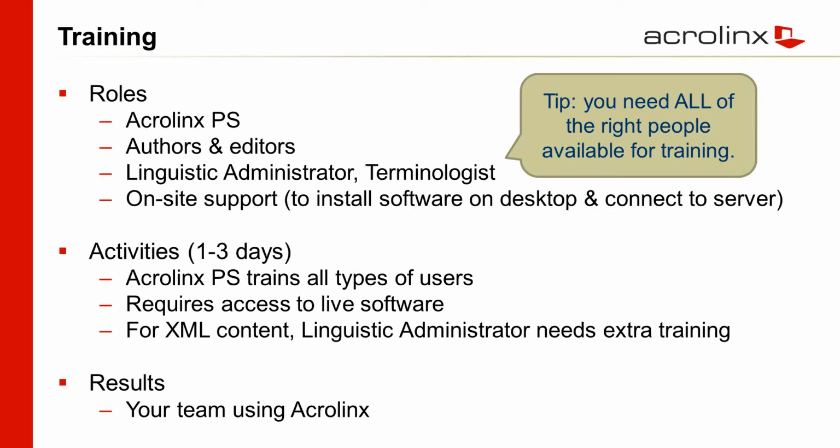Training can take between 1 and 3 days. Our team comes in and trains all the various user types. It does require access to live software, which means it has to be installed both on the server and on the user's desktop. And if it happens to be XML content, the linguistic administrator will need some additional training beyond what's talked about here. So the result is your team is using Acrolinx.